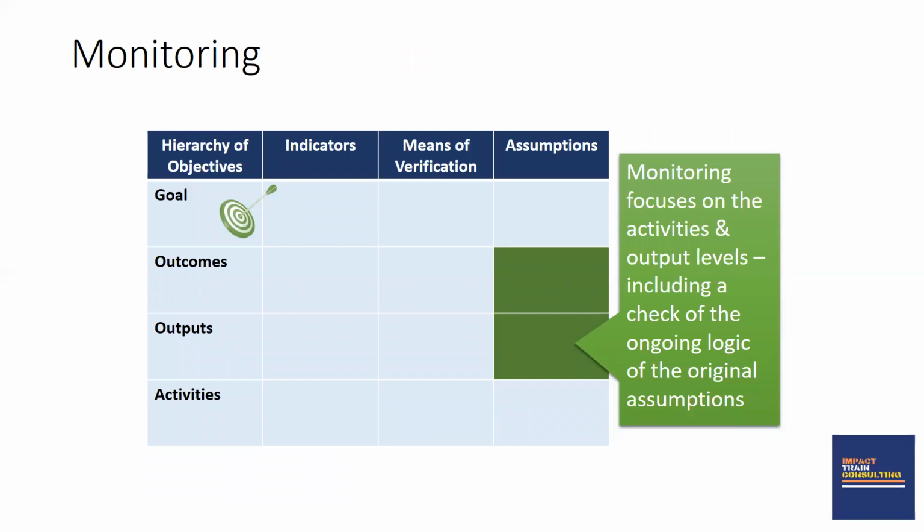Now let us look at monitoring. Monitoring focuses on the activity and output level of the logical framework. Monitoring is trying to look at these activities that I've conducted. Is it bringing us the right results? Where are we supposed to be in terms of the outputs that we're supposed to see on the logical framework?